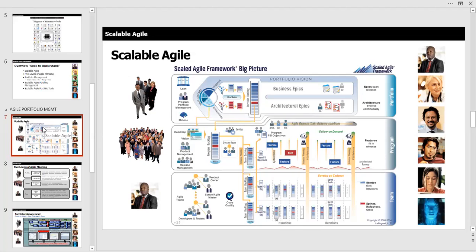So anyway, what we want to do here is talk about, at the top, in the portfolio world, epics. Below epics, we get into what I call features or use cases. Everybody's got a different way that they describe this. And at the bottom are your requirements or your stories or your tasks, the transactional work that we do in order to build our features into our releases. So the middle predominantly is your higher level scope, and at the highest would be your targets, what you're shooting for.